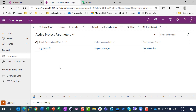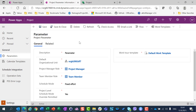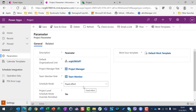Now I'm going to click Save and Save and Close. Be aware of one important thing: if you have already created projects with, say, Fixed Duration, and you change your default schedule mode here to Fixed Effort, those existing projects are not going to be affected by that change. They will stay in their previous default schedule mode. So if you created a project in Fixed Effort and then change the default to Fixed Duration, the old project will stay in Fixed Effort scheduling mode.